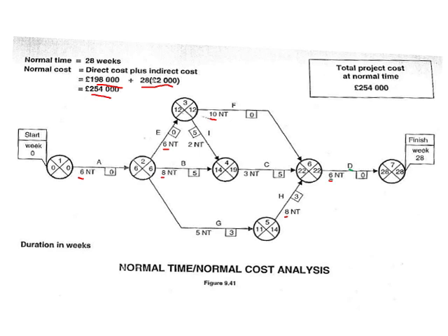That's 6 days. Then from here we can see that F is our next longest item, which is given at 10 days. Then working from there, it's 6, and then from there on it's A, which is our other 6 days. So it's 6 plus 6 is 12, plus 10 is 22, plus 6 is 28 days, which I calculated there.